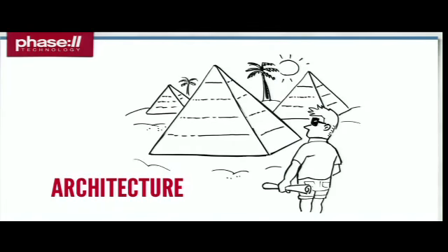So again, I'm getting all the topics that could be their own presentation. Architecture, and this is not a technical talk, so keep in mind architecture to us is as much about business architecture and business logic as it is technology stack. Architecture is an incredibly important activity that tends to get rushed through. Or tends to be done by the wrong people. The people doing architecture ought to be the most experienced people in the project. If they're not, something's wrong. Your tech lead, your most senior person needs to be involved.